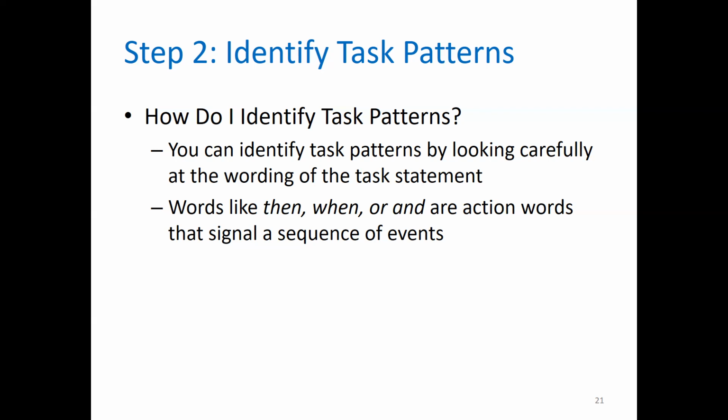Then, hear me out, you will do a to-do list, then you will print out something. So "then" would mean, okay, after you have created the to-do list, then you'll do something. So for the printing out, the predecessor is going to be the to-do list task. And then you have "when", "or", "are". These are some of the action words that generally indicate a sequence of events.